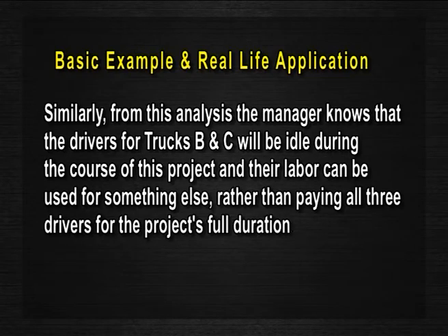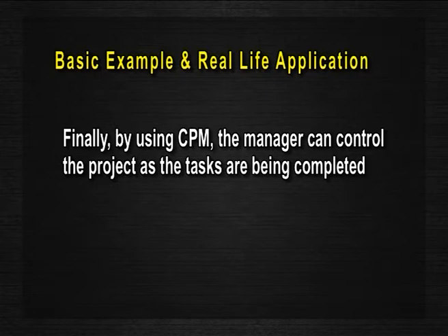Similarly, from this analysis, the manager knows that the drivers for trucks B and C will be idle during the course of this project and their labor can be used for something else, rather than paying all 3 drivers for the project's full duration.